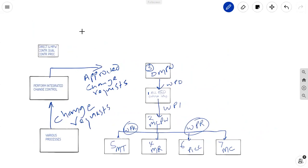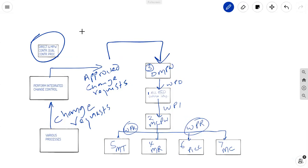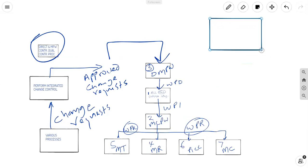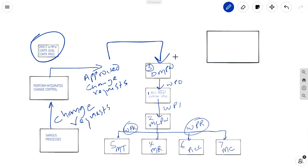So, I want you to think about approved change requests. Yes, they go into these guys as well. But I want you to think specifically about this one. DMPW. Approved change requests go in here to be worked upon in an integrative sense. When you get these change requests that have been approved going into direct and manage project work, the way I see this is a little bit of interaction will happen first between direct and manage project work and a number of other places.